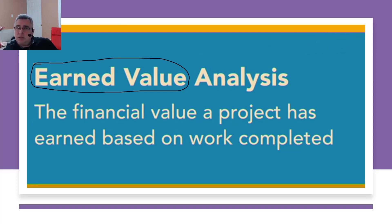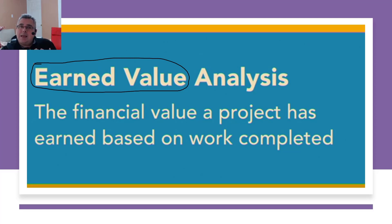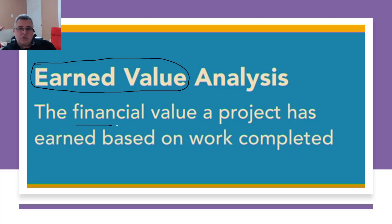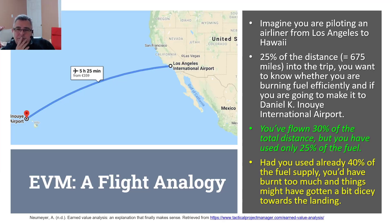That means the cost to paint each wall is 250 dollars — 250 times four equals one thousand dollars for the whole room. Once the project starts and the painter finishes the first wall, we can say the painter has earned 250 dollars to the project. So earned value is about giving a financial value to the work completed.